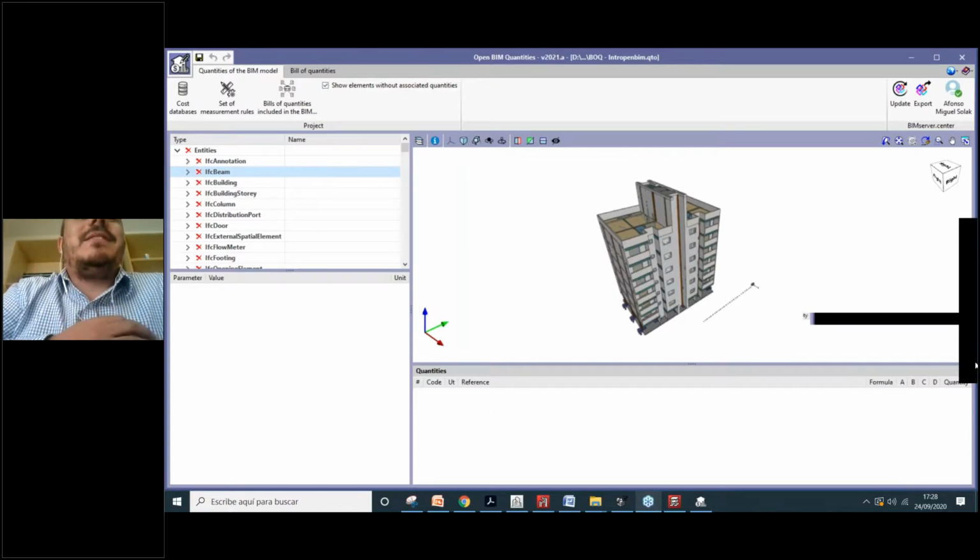Actually, that's incredible for me, because we were working on a project in Brazil. That was a project for a government, and in different regions of Brazil, we must construct the same school. And to generate the prices or the view of quantities of these schools, we just create one model and then different cost databases with the same code. And just with this option here, we can have an idea how much it would cost just changing one parameter. So it's quite interesting, this function that we have here in the program.